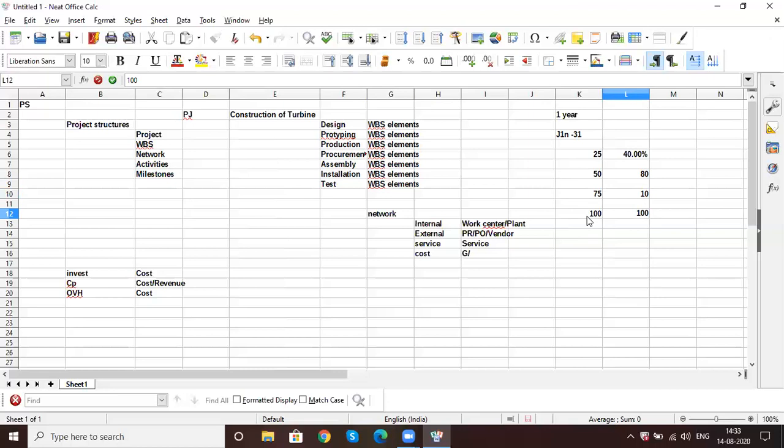So how the system knows is, after you complete the 25%, you will trigger a milestone to the customer saying the customer has to release the billing for 40% of the billing. So here in this case, it again goes for a time and material billing. So for whatever the planned cost incurred for 25%, you will be asking the customer to pay a time and material billing using a DIP profile, DP90, or you can use your SD route billing also. But normally we use time and material, because it will have actual cost.